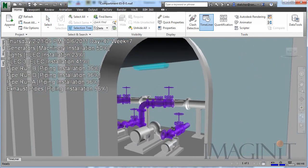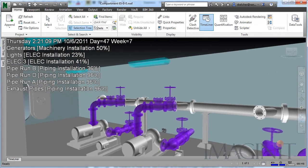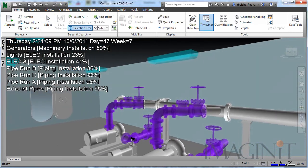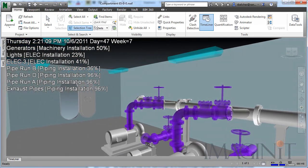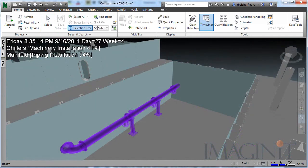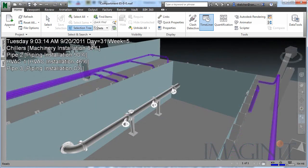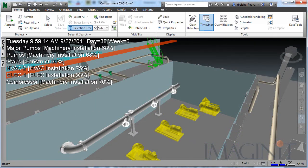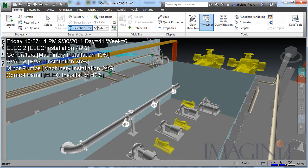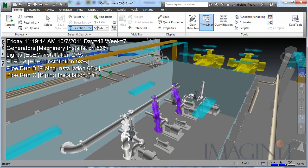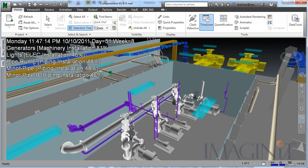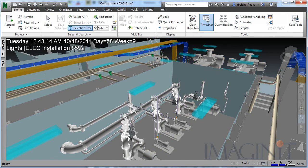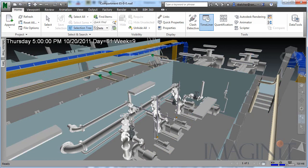Installers and manufacturers can display the master space model at any point along the proposed installation timeline. This ability often reveals overlapping processes happening in the same limited area, or a critically important piece of equipment necessary to accomplish later tasks.